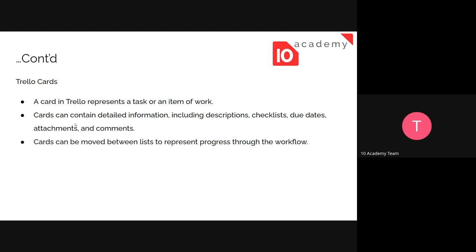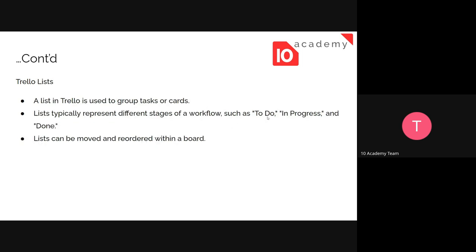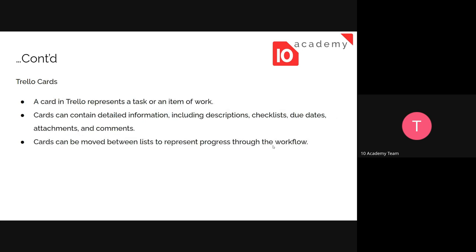Cards are found inside the lists and they represent a task or an item of work. For example, let's say we have classified the list into To Do and In Progress. What things are expected to be done inside the To Do card? If we're building a machine, we might say: draw the design, manufacture the parts, then assemble the parts. Those are the To Dos. Inside the lists are the cards — cards contain the specific things that should be done to accomplish that list.